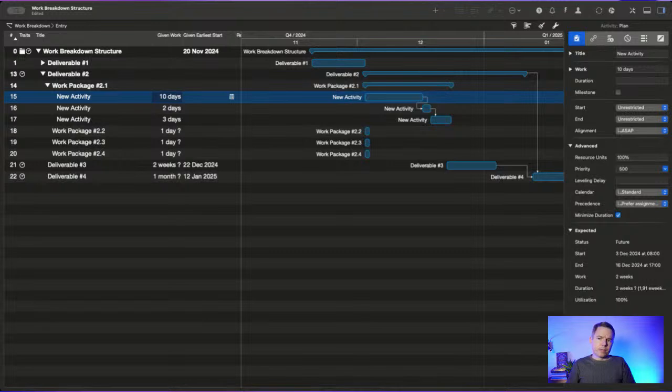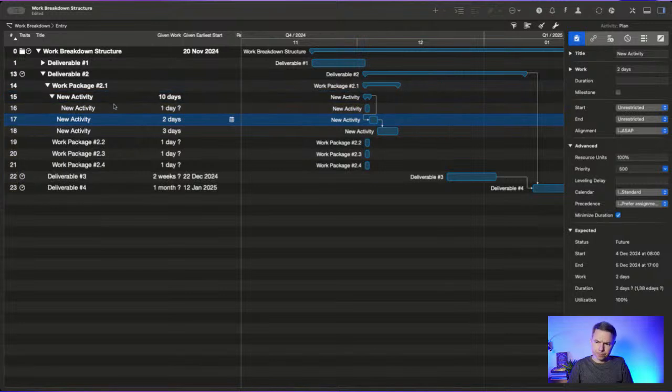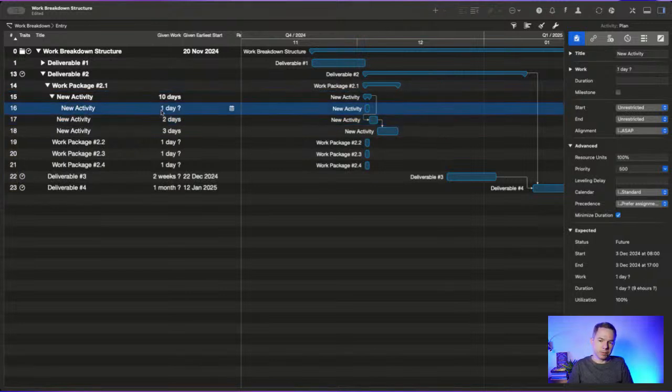And this is a good indicator that you cannot leave this task this big and it needs further breakdown. The idea here is that ideally you should break down tasks to such a level where one person can finish it end to end on their own, without interrupting or without a need of other people.